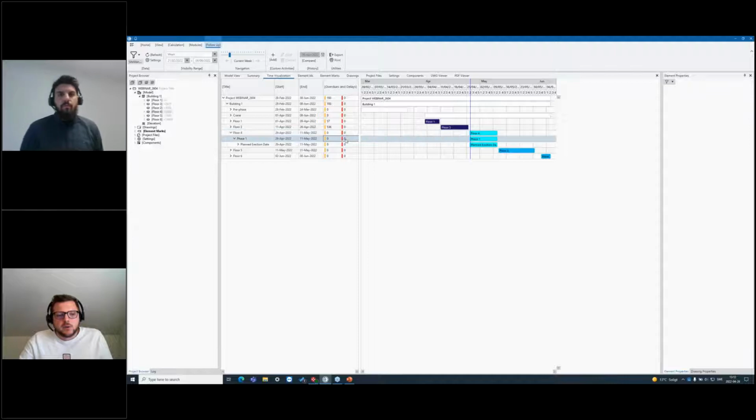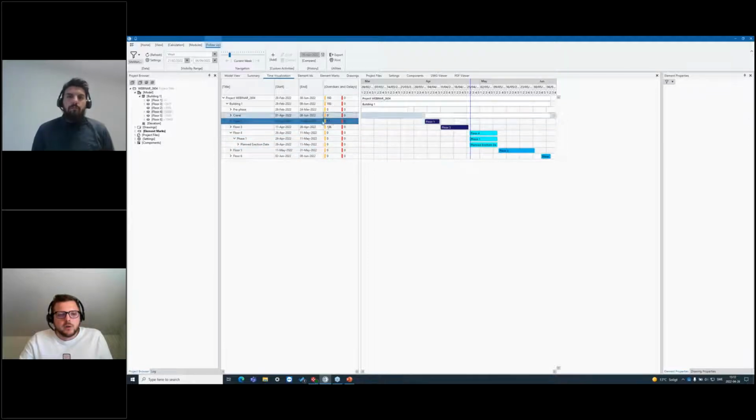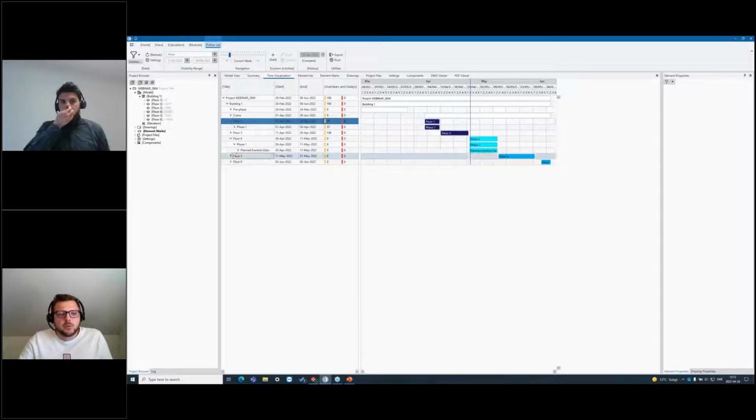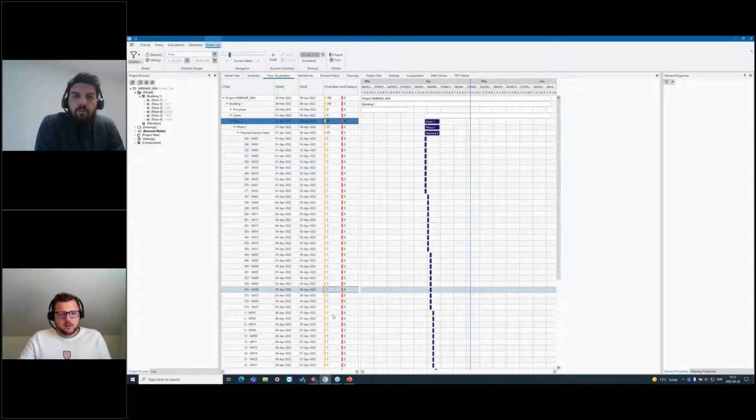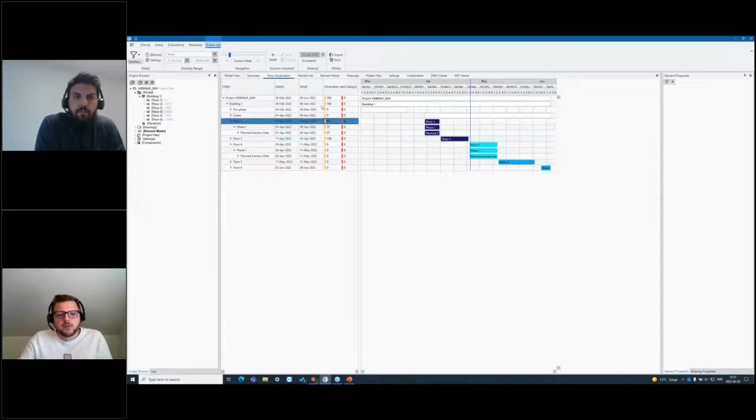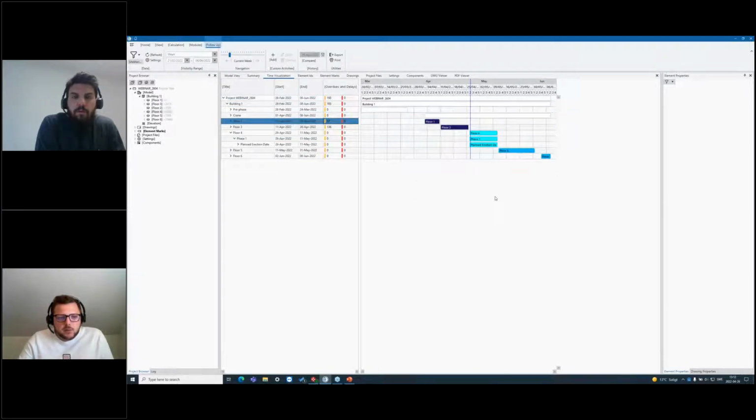And then if, let's say, one of these is overdue and I want to know more details, I can just go down in the hierarchy, and here I can see that all of these are overdue. They actually are not, but it's because I was planning this project yesterday. So basically the delay corresponds to today's date, that we have not really sent something, while the overdue is only looking at the planned delivery day and if we exceeded that, and of course delivered it at a later day, right? Yeah, okay, exactly.